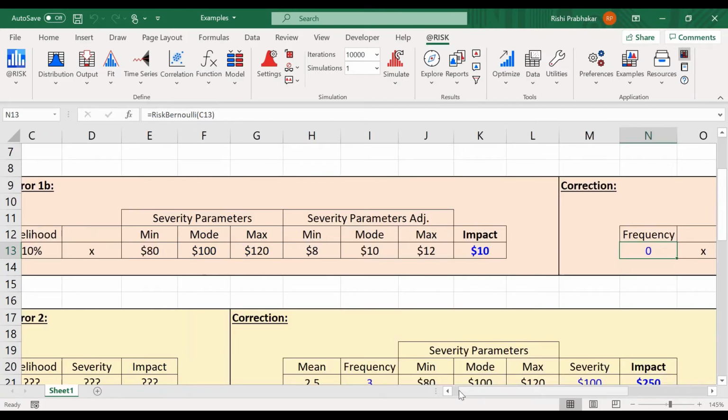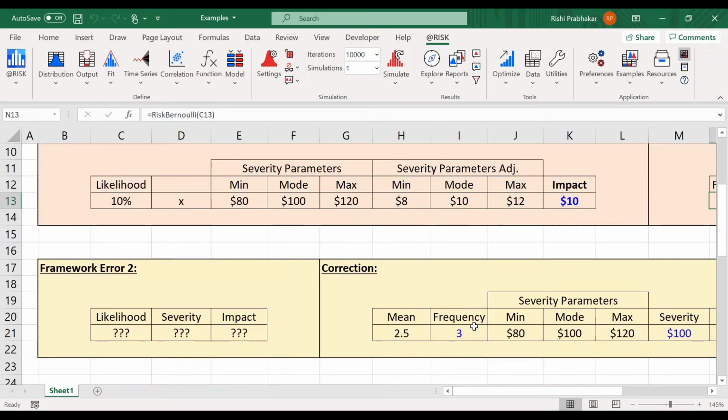But if the possibilities are beyond just 0 and 1, like lightning strikes, accidents, external weather events, machine failures, all these are really obvious and great examples, then my frequency will not be defined by a likelihood.